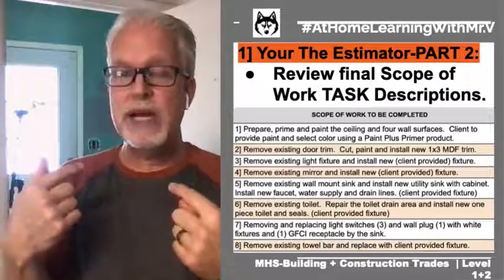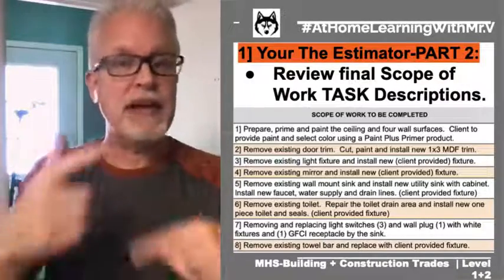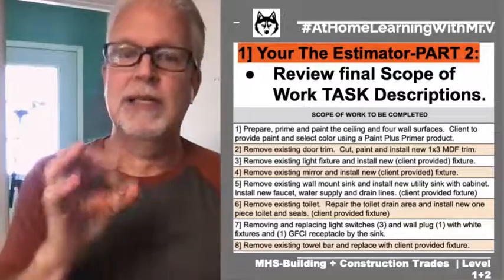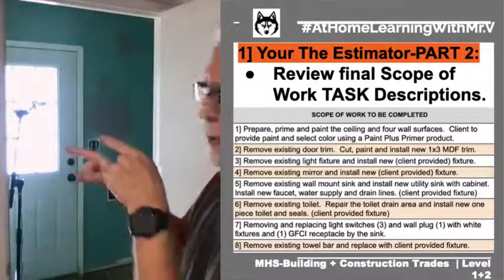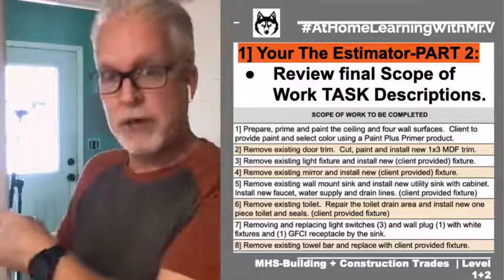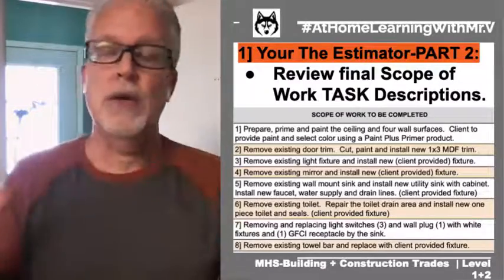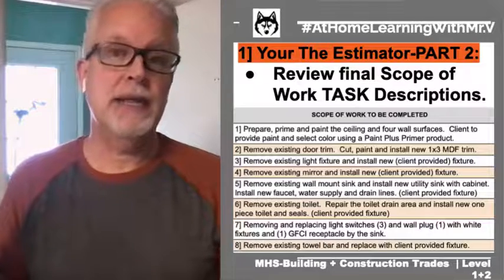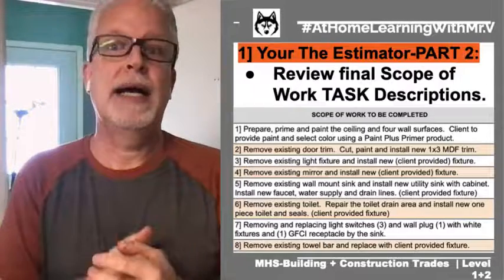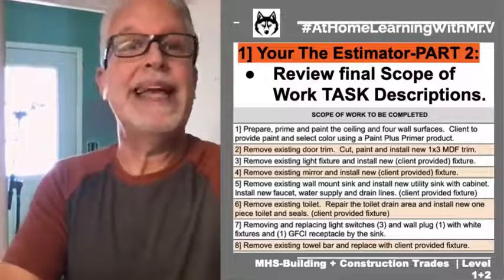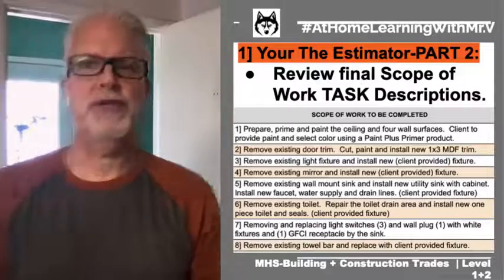Now, why that's important for me is I've got to make sure I've purchased the right parts that match up with the stuff the client has purchased, so that when we go to put our water and drain lines in, we don't have to waste time and therefore money going after parts that we didn't get. Okay, so that's pretty straightforward.